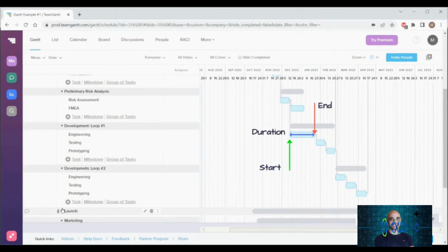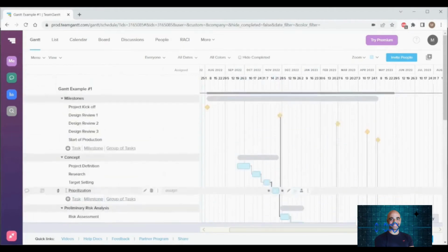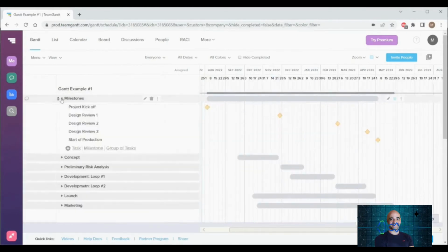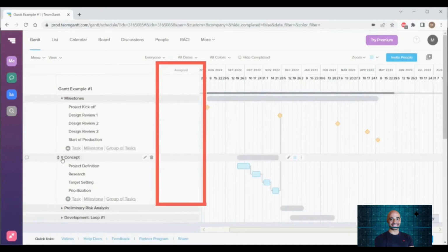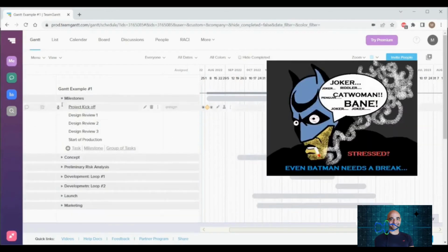After having assigned to each activity a duration, I will then identify their mutual dependence, that is, find those tasks which can start only after the previous one has been successfully completed. In this way, I'll be able to program the order in which my activities have to be addressed. Another important feature of the Gantt chart is that we can also associate resources to each activity, and therefore check whether our team is structured to support each task within the time constraints, or, in other words, if the workload is sustainable for our team members.